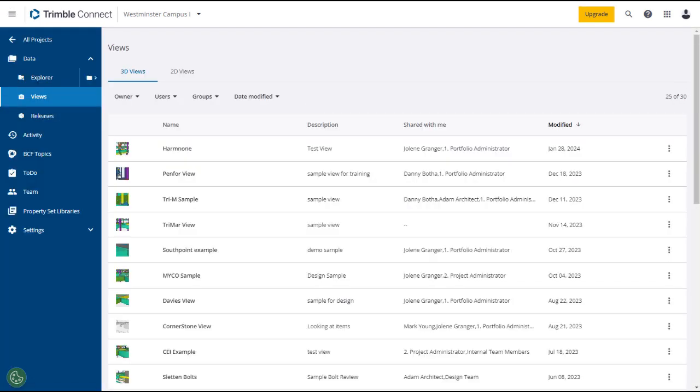Releases are used to send versions of files privately to users who are part of a project. You can create and manage releases in the Trimble Connect browser on the Releases page. Releases have two states, draft and sent. If a release is in draft state, it can still be edited. After a release has been sent, it will be locked and not editable.